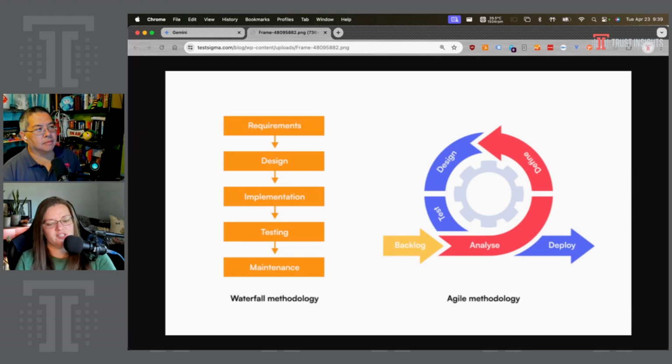So that's waterfall methodology. Agile methodology borrows from waterfall, but the difference is that it's meant to be more iterative. So you still have to do all of your high level requirements up front, but where it starts to deviate from waterfall is that you then pick one subset of requirements. You say, I want to focus on these three. They're the most high priority and most important. Let's start building those out and put everything else off to the side. So you focus on those three and you go through the design, implementation, development, testing for those three.